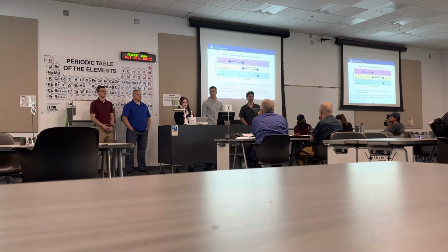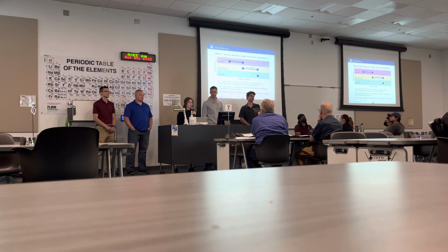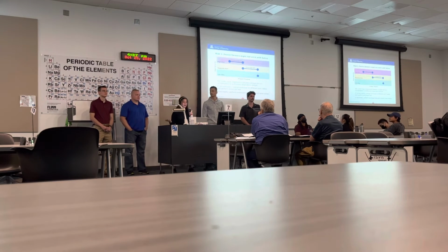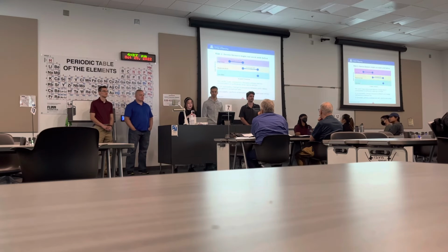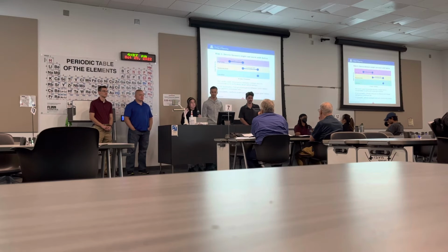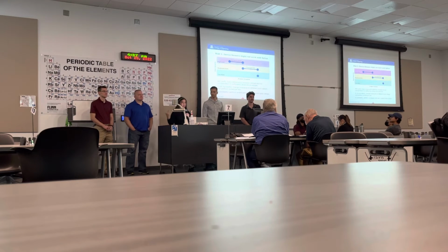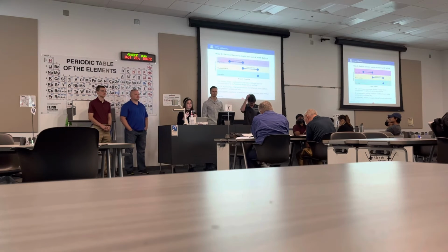Therefore, Dr. Head said we could procure a junior mechanical engineer in case we needed more guidance in these subjects. Our risk number 2 is that the device sensors might not work with saliva. So we will be performing a voltage and ion concentration test on a sufficiently large saliva sample. In case this is successful, we will prototype with the current point design. But in case it's not successful, we will change the prototype to a different point design and perform a prototype test.